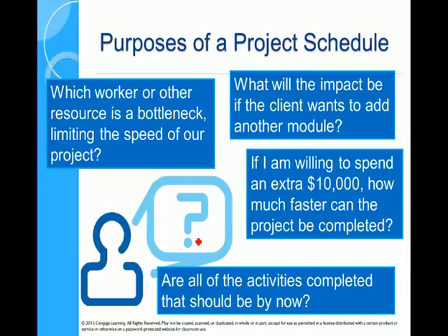Can we crash a project? Crashing a project means that we throw extra money at a particular set of activities by adding additional resources or technologies, or finding an expert in that. So the basic rule of crashing is, where do we put our money to shorten the schedule? We'll talk about that throughout the labs, is the main thing.